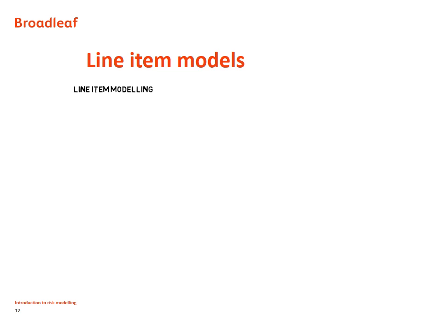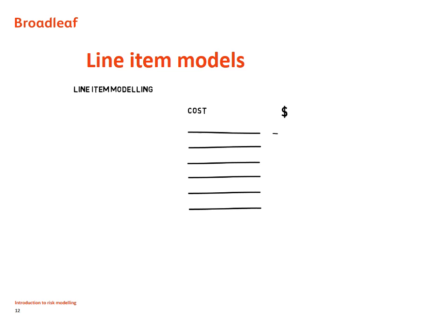Line item risk models usually apply a distribution of costs to each line in a summary of the estimate. This method evolved from the way estimators used to make allowances for risk as fixed amounts line by line, and some still do. Instead of putting a fixed allowance against each line, they might now put a distribution of values against each line. It looks simple, but soon becomes either unrealistic or very complicated.